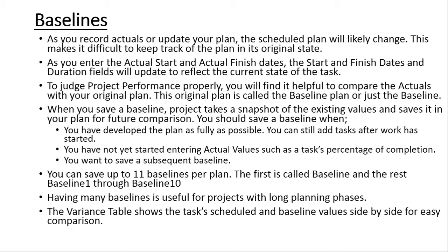In MS Project, when we start entering the actual data, things like start date, finish date, and durations of various tasks, the program will now change those values that we had put on the plan. So meaning that your plan is now changing to reflect when you actually started a particular task or when you actually completed that task.